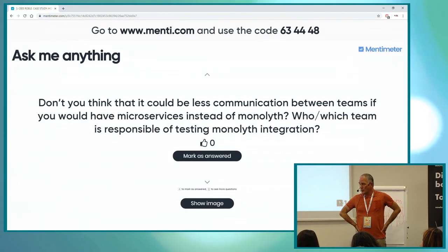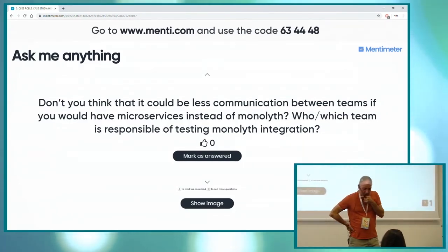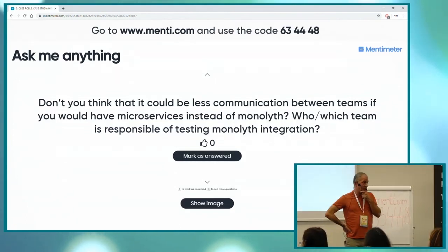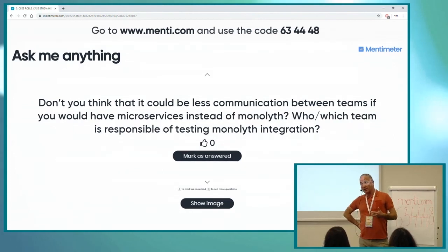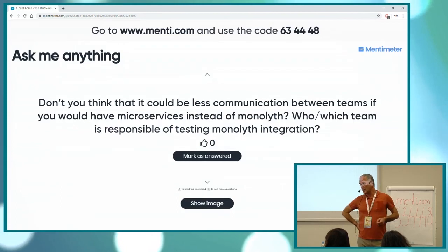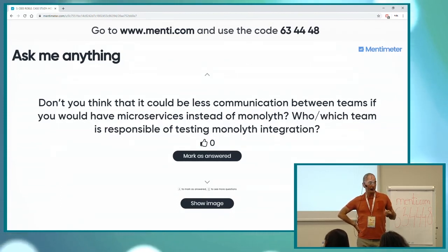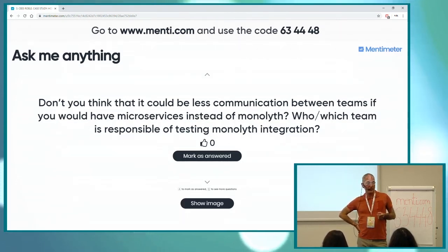I think most monolith integration. Yes, sorry, I was thinking of the microservices. There is a release team at this moment that is actually checking the monolith for 1 week before it is released to production. So if the release QA team finds any issues, they go back to the, let's say, teams responsible for the code, who might have to fix it before it goes live.